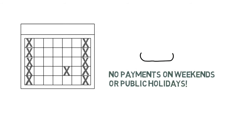Payments are not made on weekends or public holidays and this must be factored into the timeline.